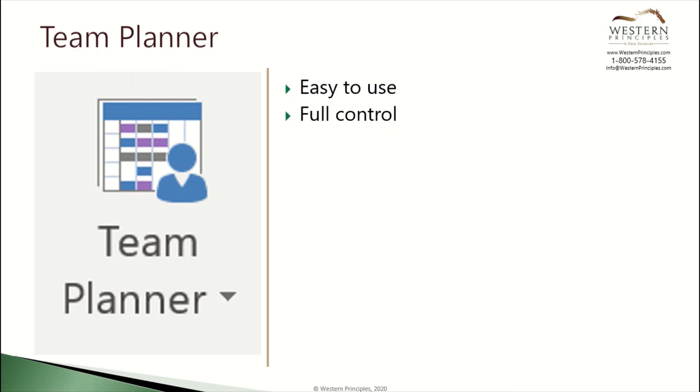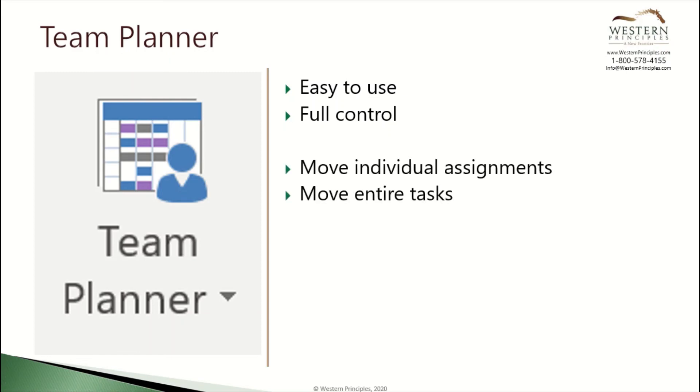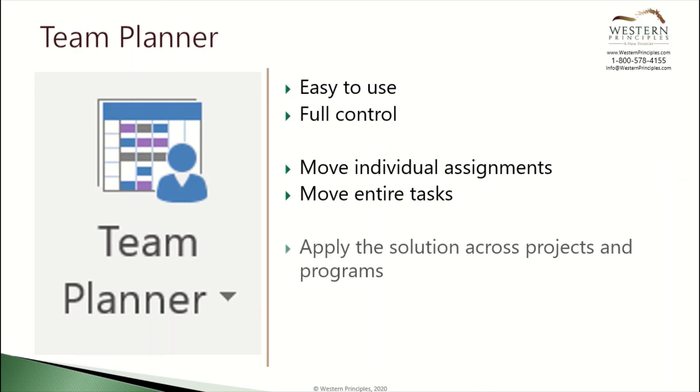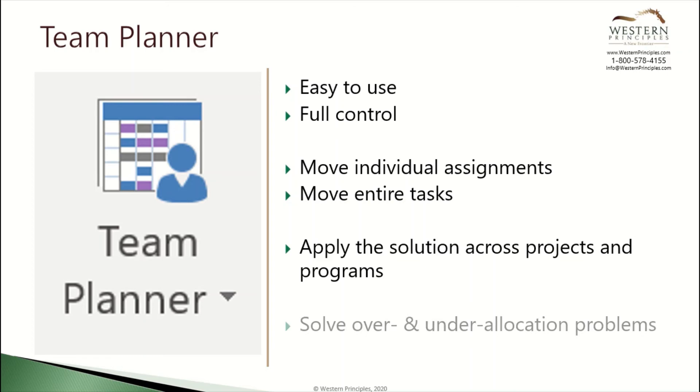The team planner is easy to use and gives the project manager full control over how tasks are scheduled. The team planner lets the project manager move single assignments or complete tasks. The team planner can also be applied to resources across projects. If you open multiple projects with the same resources in them, you can see their assignments on different projects and you can drag and drop assignments to fix under and over allocations in the same way.